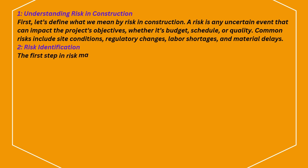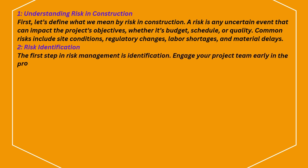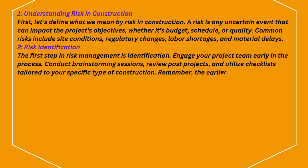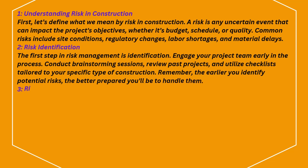Risk identification. The first step in risk management is identification. Engage your project team early in the process. Conduct brainstorming sessions, review past projects, and utilize checklists tailored to your specific type of construction. Remember, the earlier you identify potential risks, the better prepared you'll be to handle them.